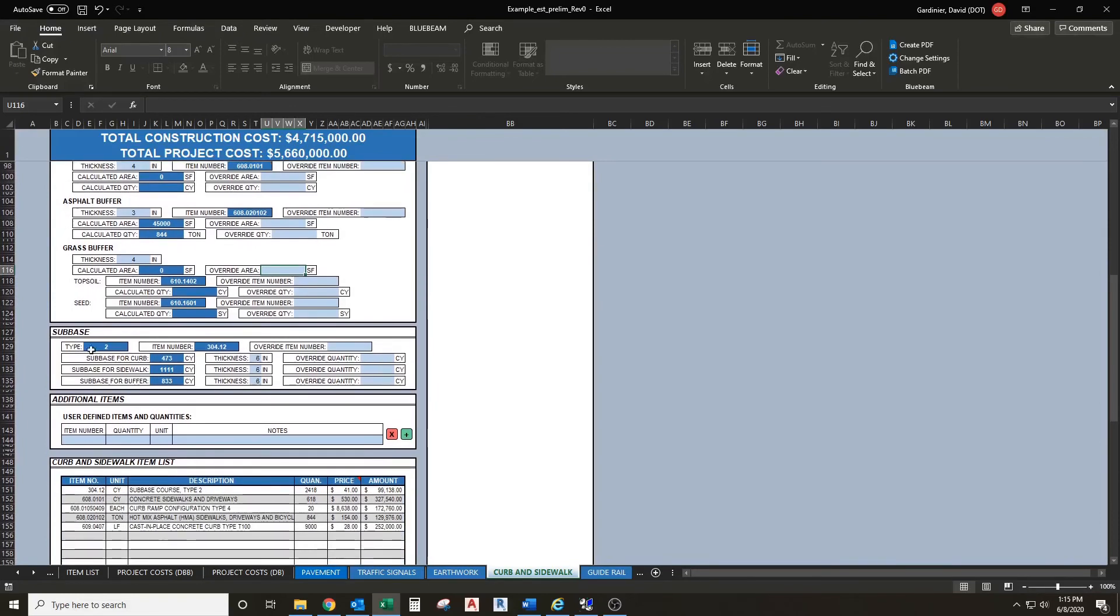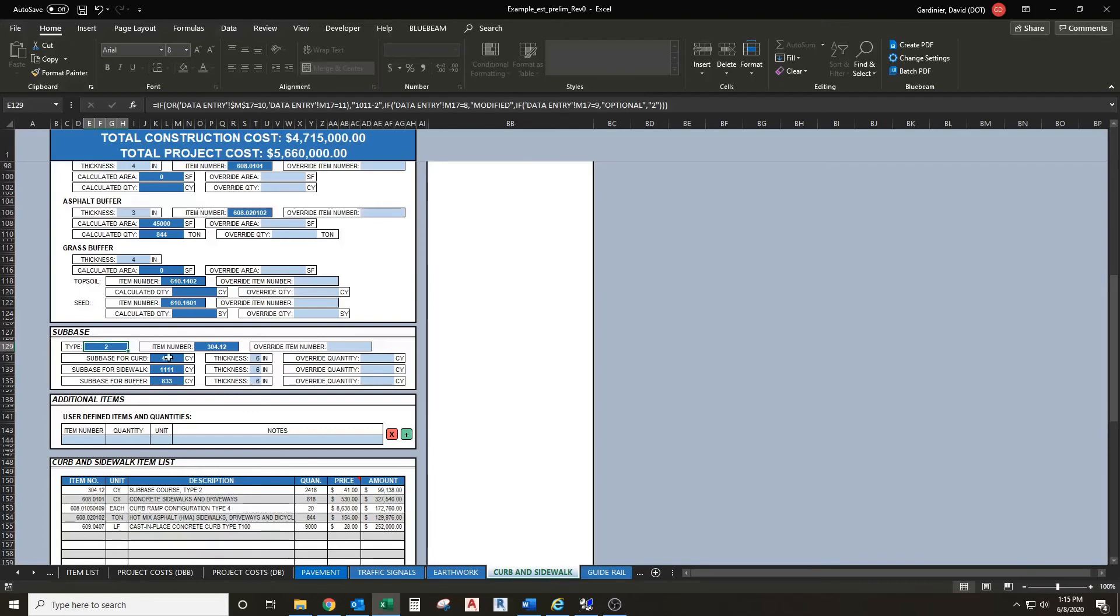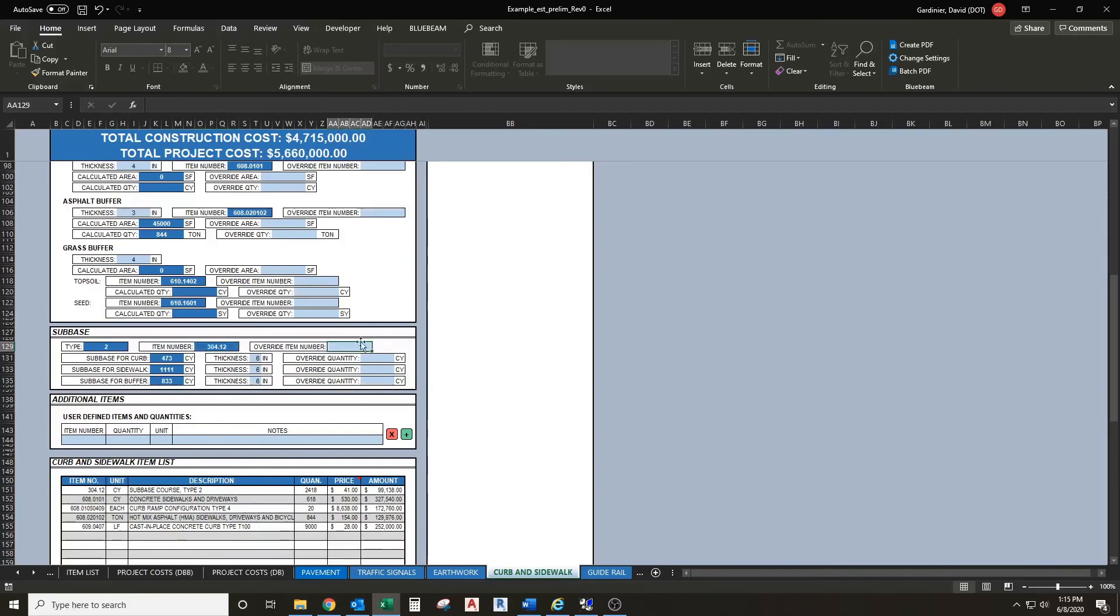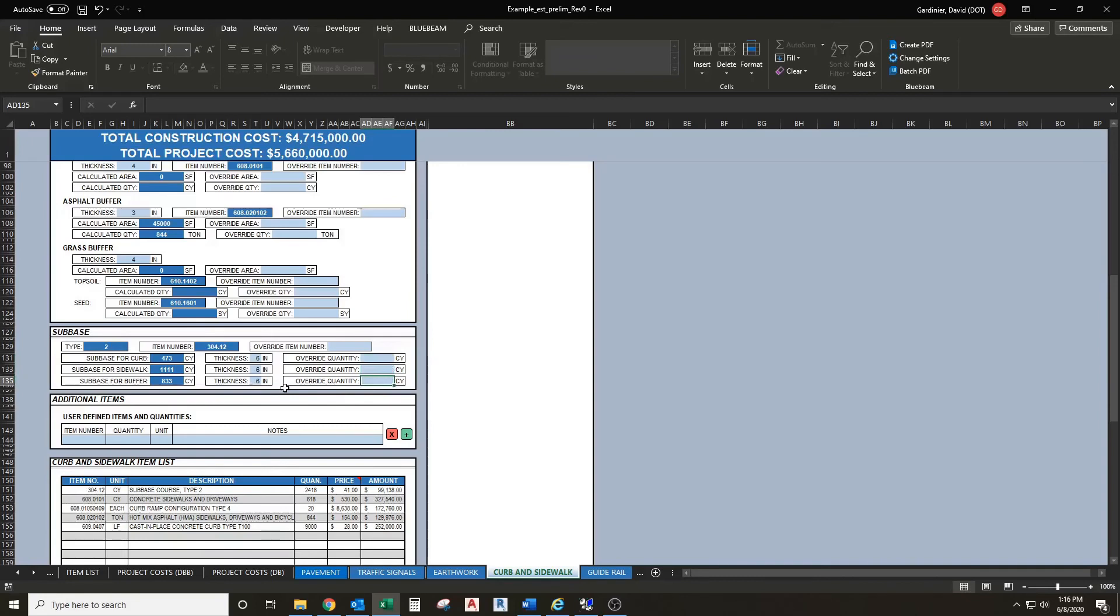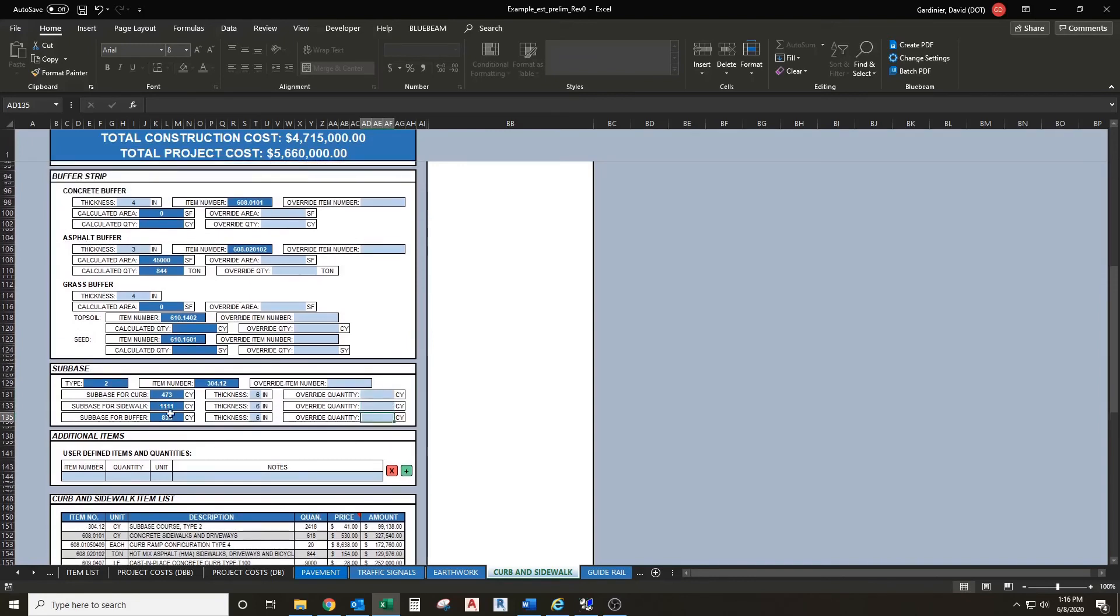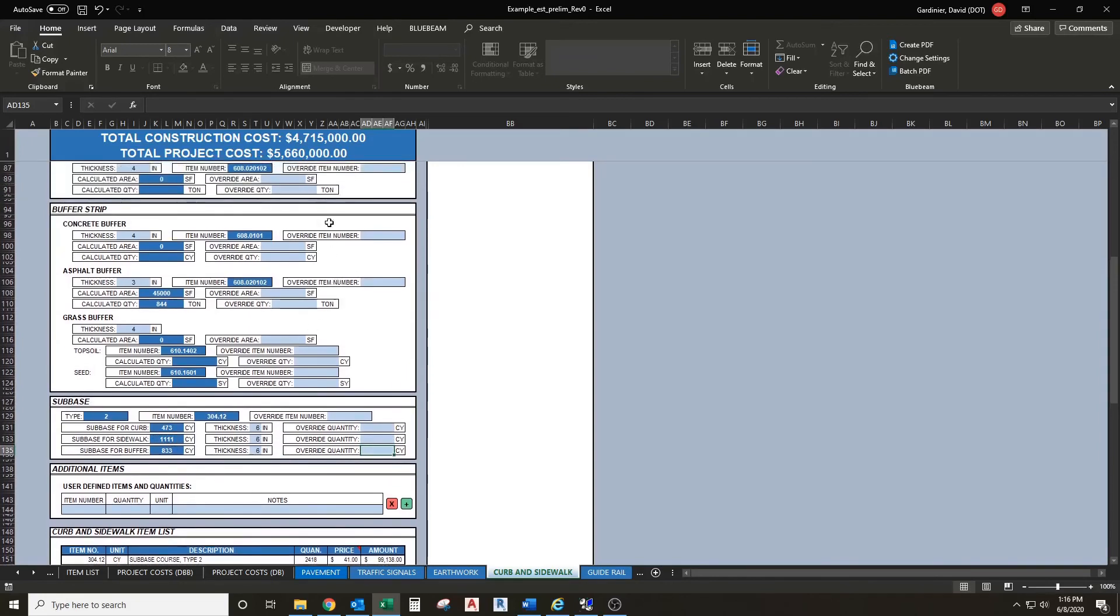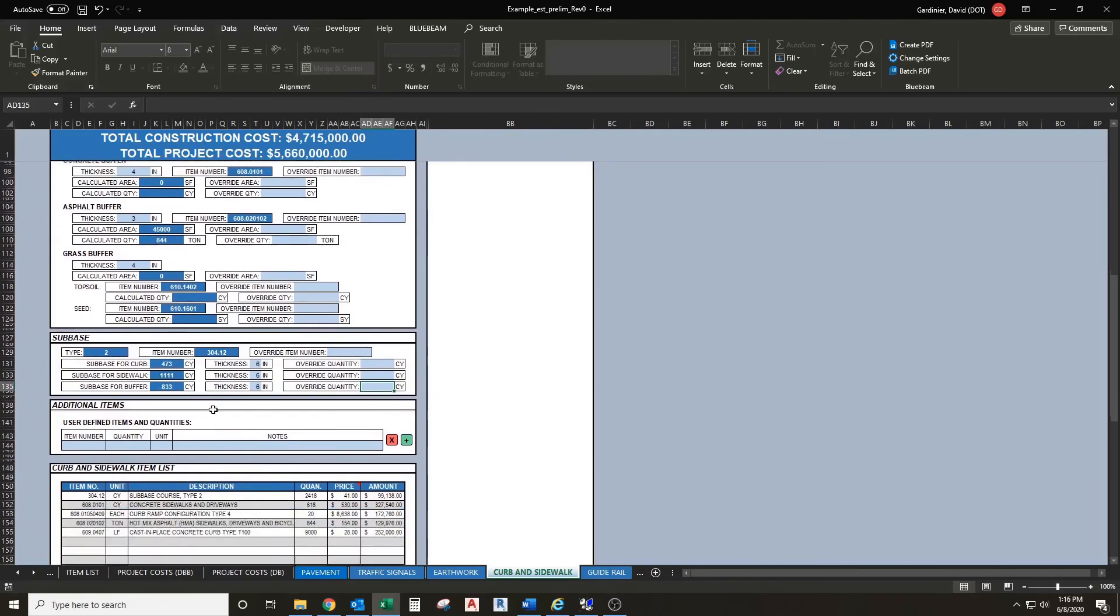The last section was the sub base. By default it's going to select a sub base type based on regional preferences, which will develop your item number. You also have the ability to override the item number if you don't want to use the item number this comes up with. It's broken into three sections: you have your sub base for curb, sub base for sidewalk, and your sub base for your buffer. By default all of these thicknesses are 6 inches. We give you the flexibility to change those thicknesses as you wish, as well as override your actual quantity there. These quantities will update if you override the areas up here, it will update with those as well.